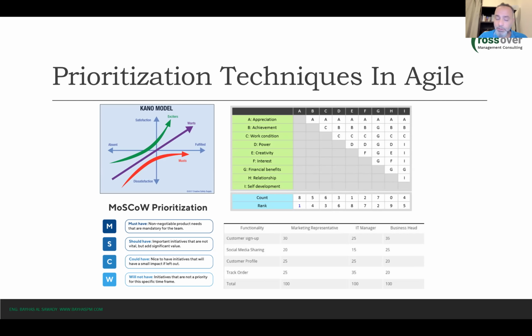While in agile approaches, as we mentioned, things are a little bit different because in agile, we use what we call the inverted triangle model, where we fix the time and cost of the project and we allow the scope to be variable, right? We document the scope in a product backlog that is owned by the product owner.